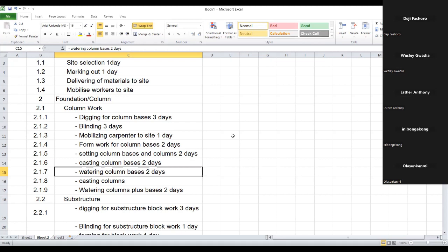So what we are trying to do is see how we can take control of these 3 constraints. The best way to take control of your scope is to capture every line item on your WBS down to the smallest measurable chunk, which is your work package. After you have done that, you can easily estimate duration and cost of each of these items.